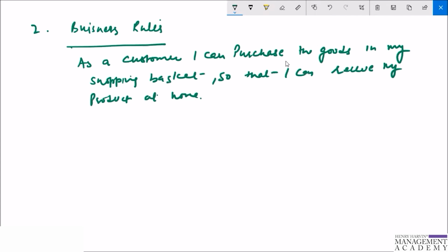So what we can do in the business rule, for example, as a shop owner, I can decline orders that are below $10 because they aren't profitable. So one business rule is denial of order. Right. So as a shop owner, I can decline the customer from outside the US, or maybe India, because the shipping expenses make these orders not profitable.